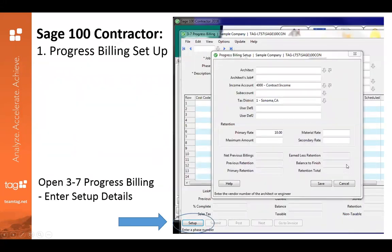This is a screenshot of what the progress billing setup looks like. You'll go into 3-7 of your Sage 100 Contractor system and click on this button down here called Setup. That will open up this window where you'll be able to put in all of your information. There are user-defined fields here so that you can additionally track things that Sage 100 Contractor isn't already set up to include. You can put in your retention rate and all of your default information as well.